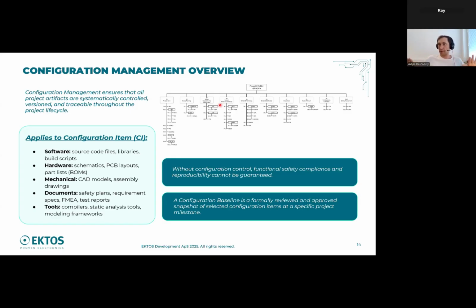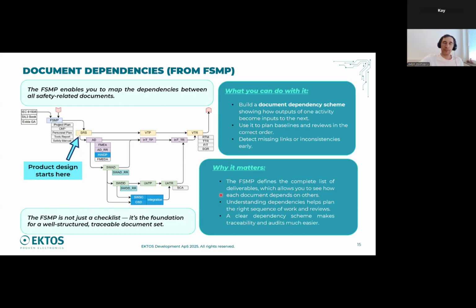So you are creating a structure, and now if you start development, people who read this document understand where you can find this item or that item, how to store it, and where to place it. Having a list, you have a scope for your project. Then the next step of developing a configuration management plan is creating a map of dependency between documents.